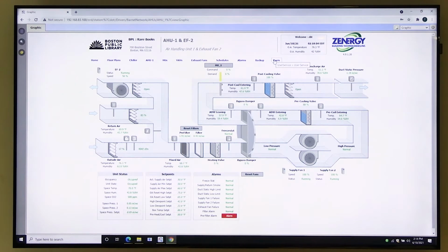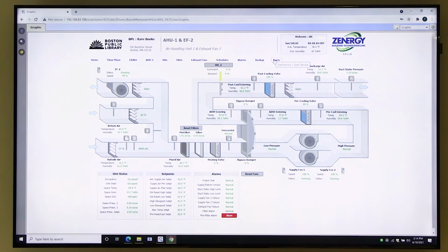Through construction and everything, we might put our own email address in there just so that we can get alerts if something happens as the building's getting through the construction phase. But once we get to this point, we want to remove ourselves from the equation and make sure that email is something that you guys own, so that it's being sent from your servers. So that's something we would look for, so that we can send out emails.